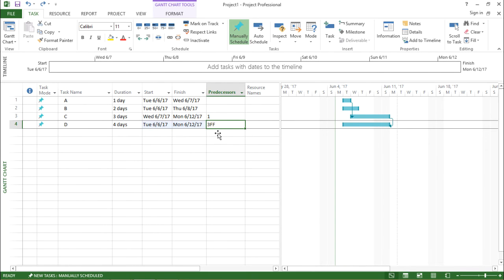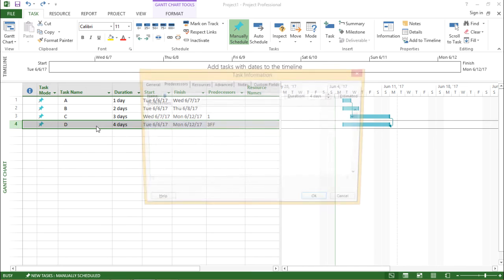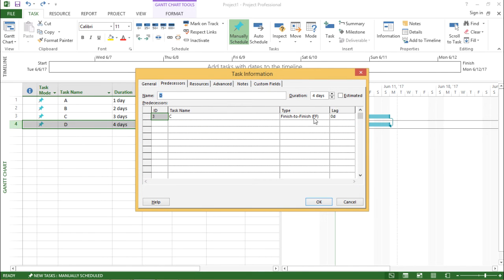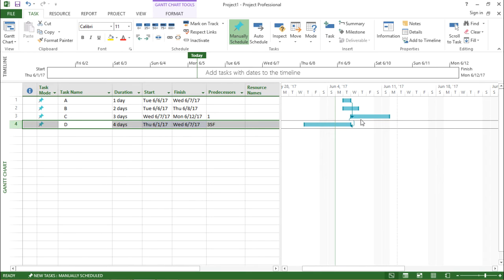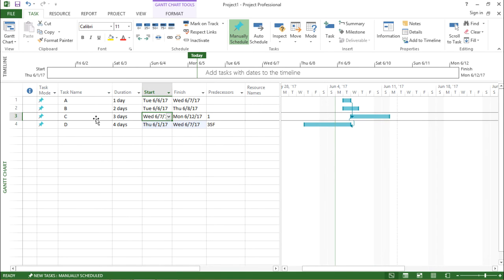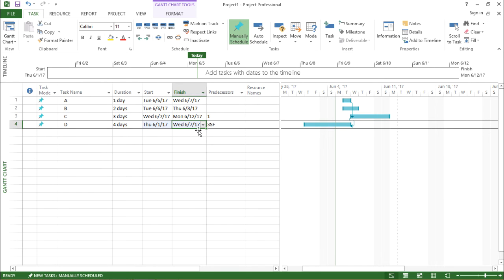Moving on to the last type of predecessor: start to finish. I will double click on task D, hover my mouse to the type, click on the drop-down box, and select start to finish. I hit OK. If you focus on the right-hand side of my screen, the end date for task D has been pushed back to the start date of task C. Similarly, on the left-hand side, the start date of task C and the finish date of task D are the same — it has been pushed back.